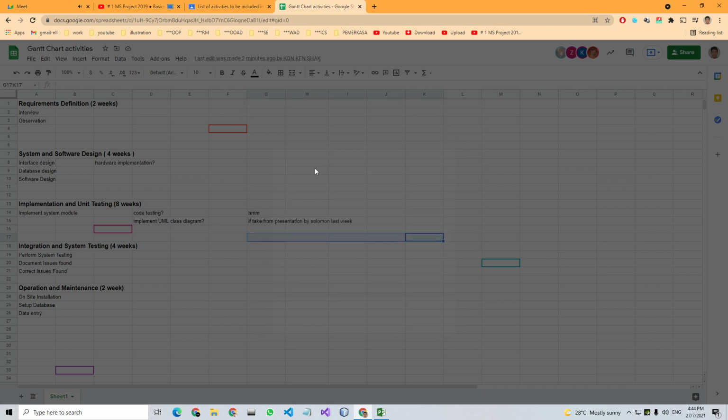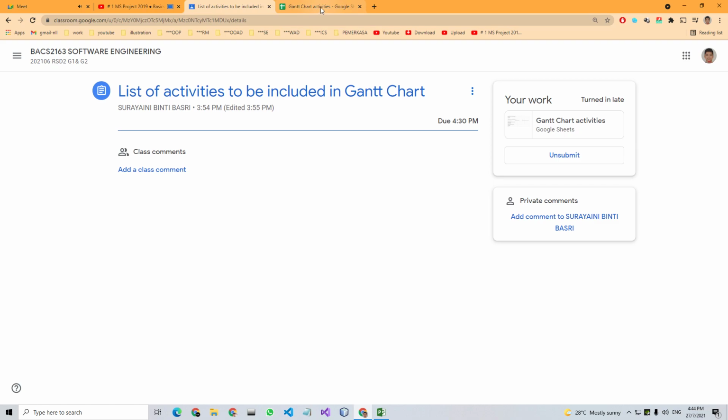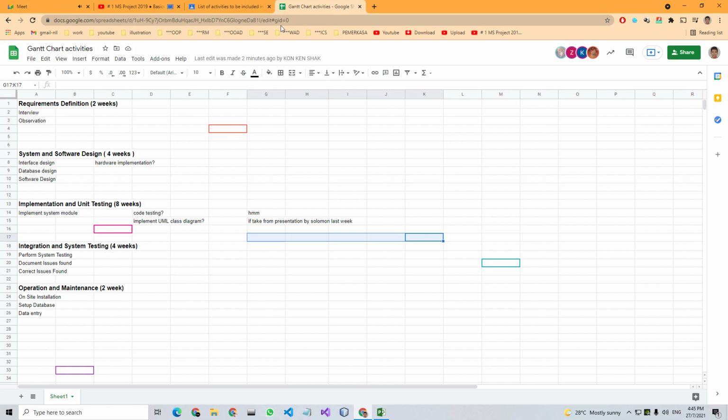So the question was, in the RAD system, do we do the system requirement together before doing the modules and testing separately? Actually, each of the modules will have its own system requirement. Meaning each of the modules will have its own system requirement gathering phase.